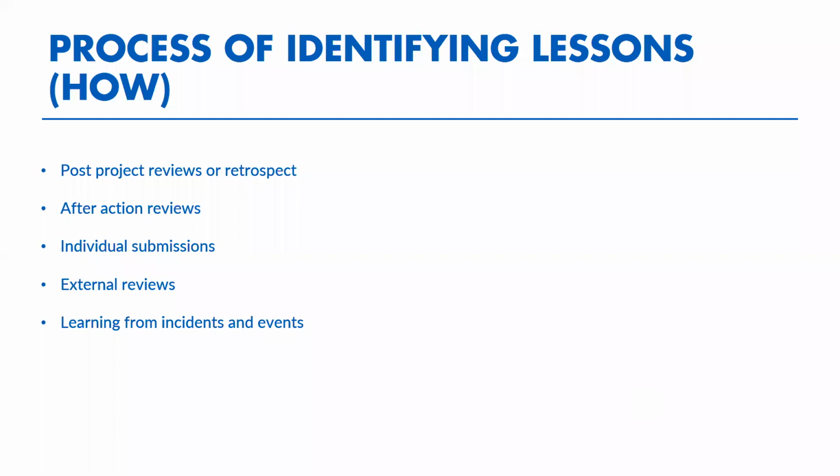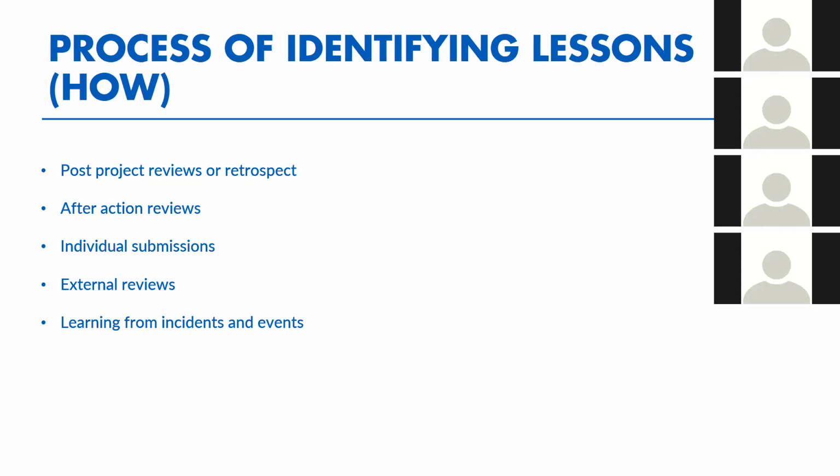It also included after-action reviews, which are slightly different and take a much shorter time period. There's also individuals, if you can speak to individuals involved in the project, and that's individual submission of lessons based on that individual experience. External reviews, these are external evaluations, which we are all expected to do as part of our projects. And of course, there are much bigger program level evaluations. We can also identify lessons from analysing incidents and events.